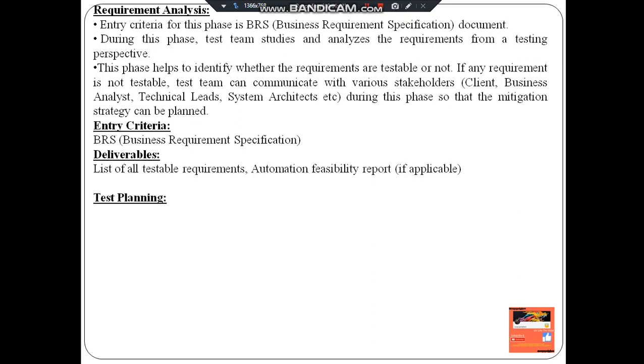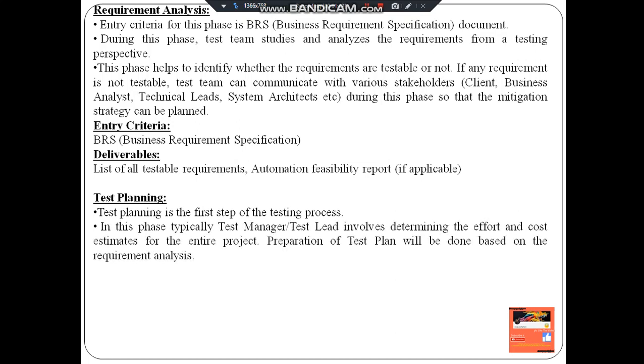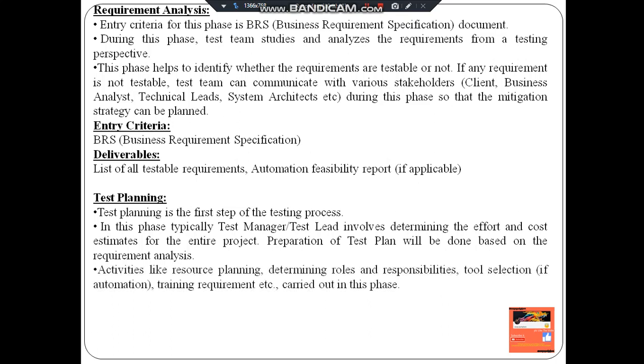Second, test planning. Test planning is the first step of the testing process. In this phase, typically the test manager or test lead involves determining the effort and cost estimates for the entire project. Preparation of the test plan will be done based on the requirement analysis. Activities like resource planning, determining roles and responsibilities, tool selection if automation, training requirements etc. are carried out in this phase. The deliverables of this phase are the test plan and effort estimation documents.